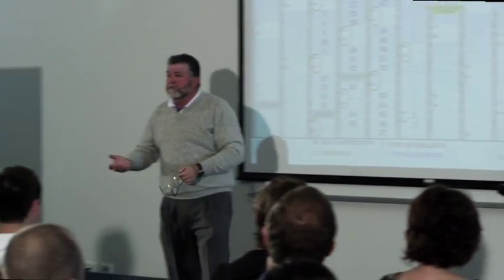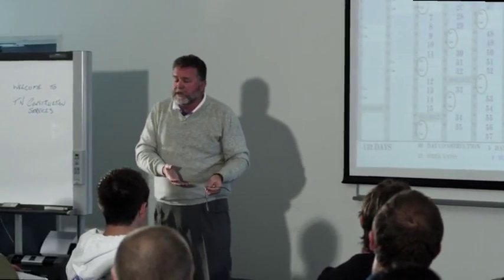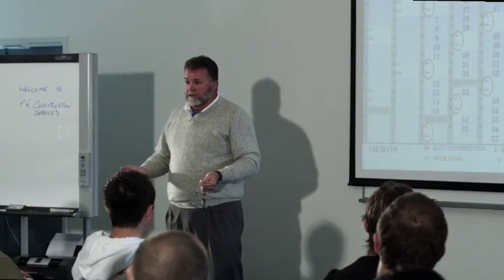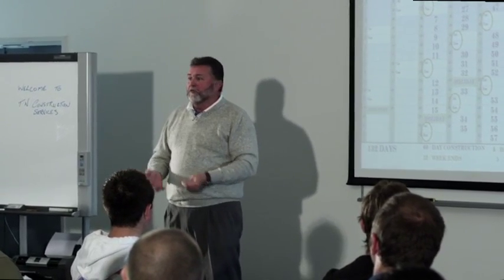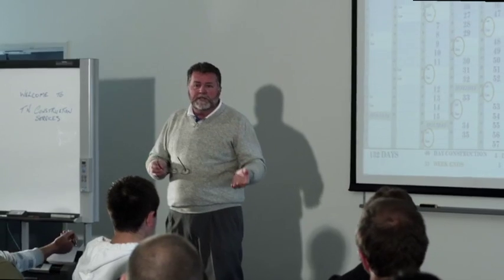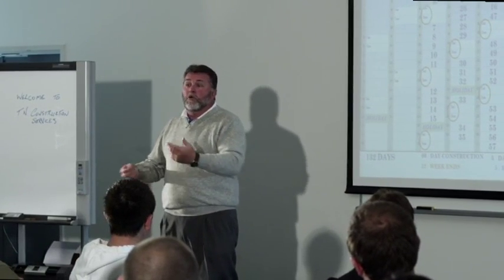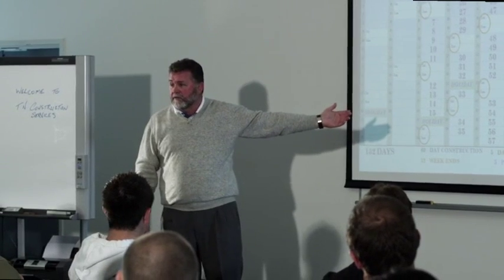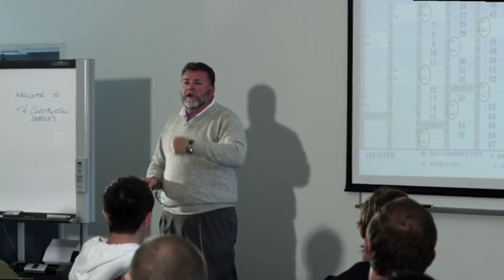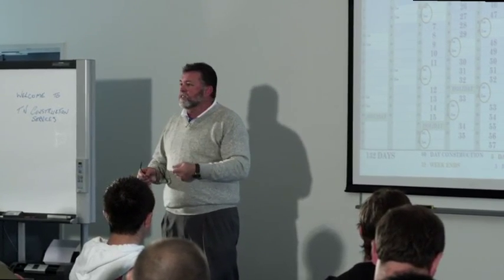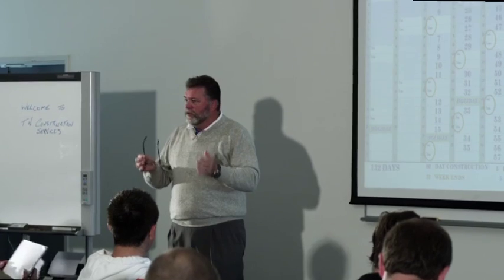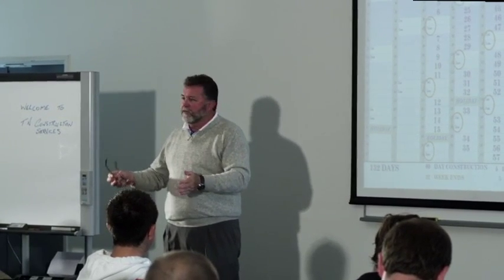But if we go back, for example, to December 2010 and January 2011, what happened? It rained and it rained and it rained, and then it flooded and it flooded and it flooded. If you're out at places like Emerald or out west, it actually flooded twice. So how is your program going to go then? No good. So you would need to give the owner a notice of time extension, because that is something outside of your control. What is the length of the time? You're not going to know. Do it in two week blocks if you have to, do it for a month, whatever.